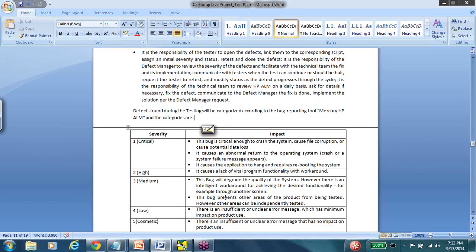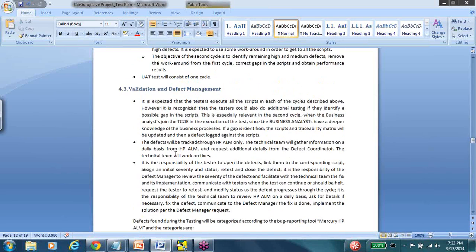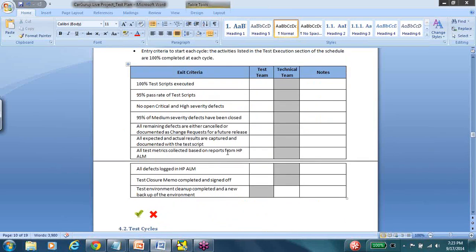Moving on, Emilio's question was, how do I know that there is a high rate of defects? Define high, correct? One way to define high is setting these numbers. No critical or high severity defects exist. Sometimes the clients will give you a number, less than 3 or less than 2, something like that. When you know it is less than 3, that according to the client means a low rate, and that's what you're looking for.